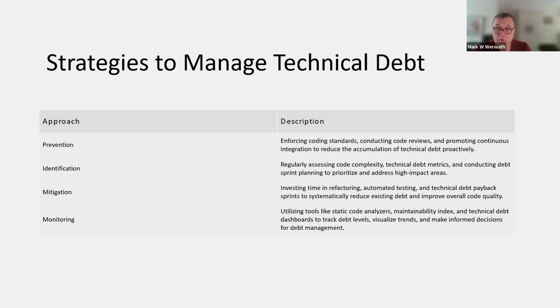Meaning it's got to be scheduled and planned just like the new features and the new capabilities that you're putting into your project. Mitigation: invest time in refactoring code. I know nobody wants to talk about it, and it almost becomes a little bit scary or insurmountable. But in some cases, without making that investment now, you're going to pay a much heavier price later.